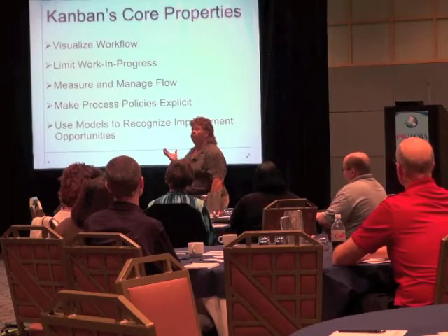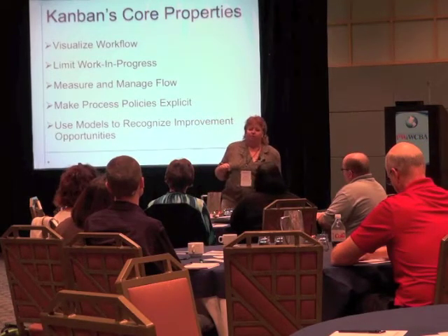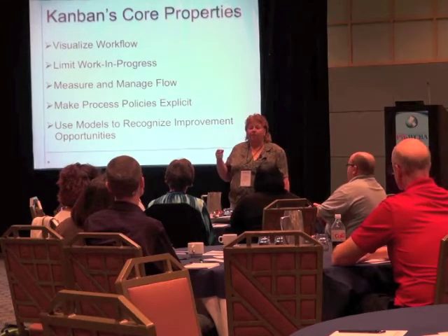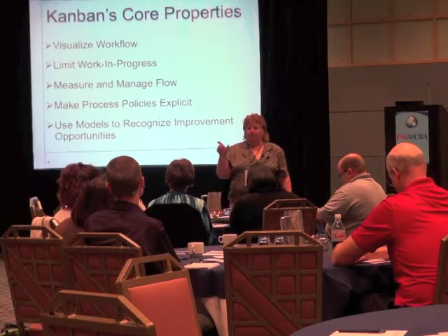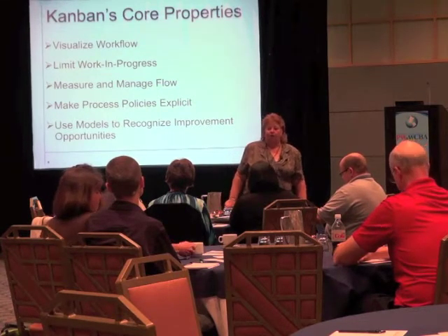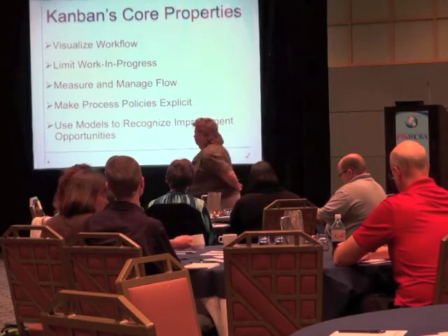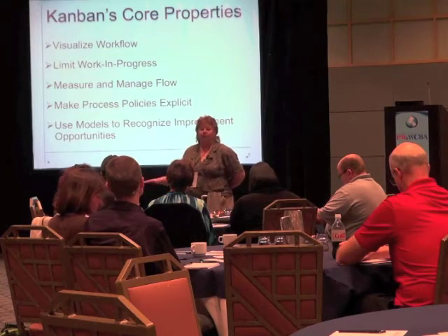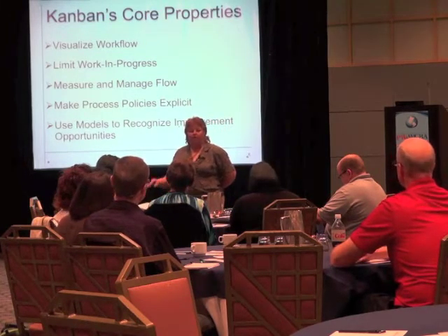So then you really do need to have good metrics. And the metrics can be very simple. When I started this, I started with an Excel chart, and I simply put a date in and a date out. So I understood how much time a work item spent in a queue. Make sure that whatever your policies are around process, everyone knows what they are. Change them when you want, but make sure they're explicit.